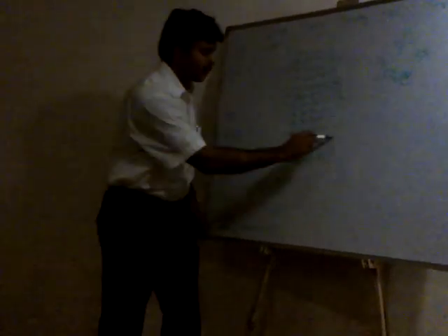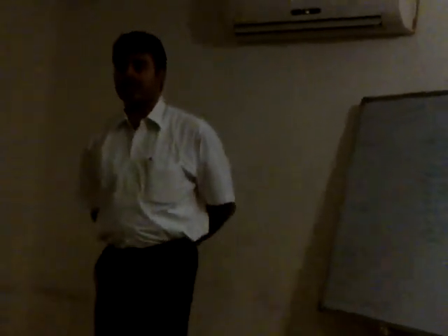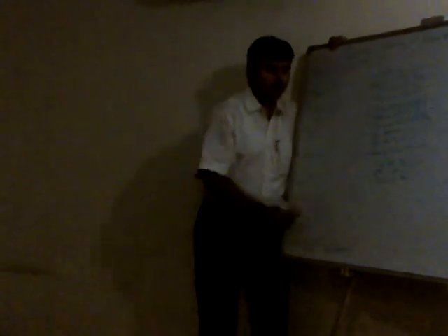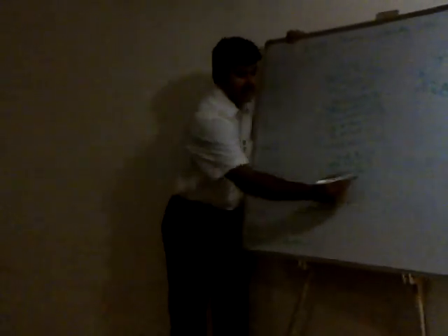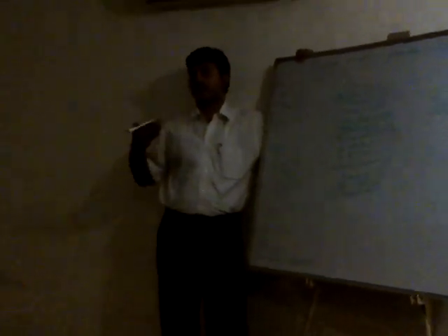determine budget. In order to estimate cost, what were the inputs that you required apart from scope management, apart from cost management plan? You need to know what the deliverables are, you know the activities, then only you will be able to estimate the cost of that. You got the activity cost estimates, you got the basis of the estimate, that is the logic on the basis of which you arrived at the estimate, and these were also fed as input for determining the budget, and you came out with your cost performance baseline, or in other words, the budget for the particular project.